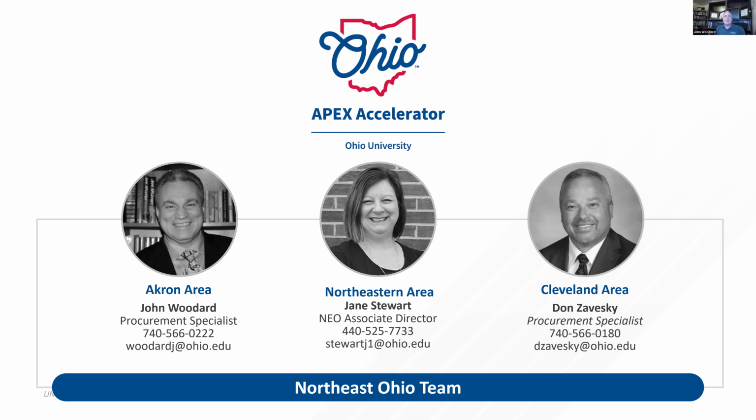What you can do is say, my project manager / liaison will run the project and at the same time fulfill the liaison role to the city. That's good. If you have someone who is qualified to handle two different job categories based on the resume, yes, you can double them up. You can say this person will handle job A and job B, here are his credentials in his resume, and call him out as a special asset. Say, we have a special asset that will save you money because he can do two roles at one time, and then throw that resume in there. If he's got certifications, back him up with that. So you can do it, but you have to be careful how you do it and which positions you combine.